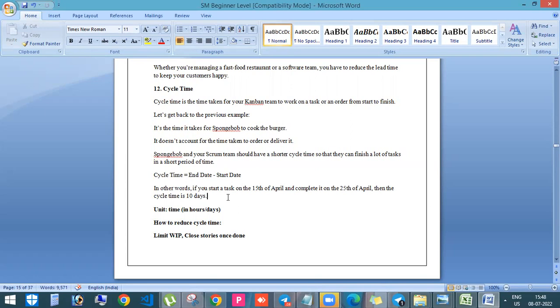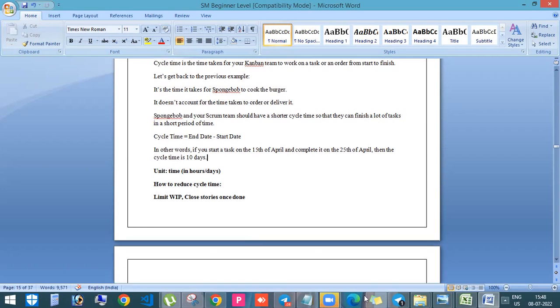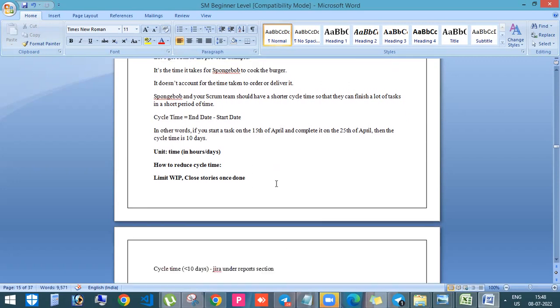Few tasks we can close even within like five hours or four hours. So in that case, the unit will be in hours and sometimes like when it comes to stories, it may take like even like 10 days time. So the cycle time is 10 days in that case.